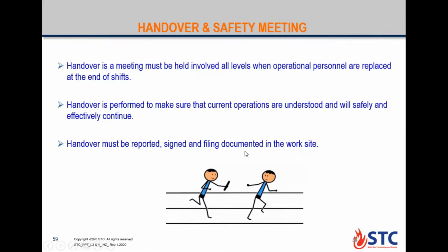filed and documented in the filing system at the work site for at least 6 months, to be a reference if you have an audit or checking on the previous operation. Okay.